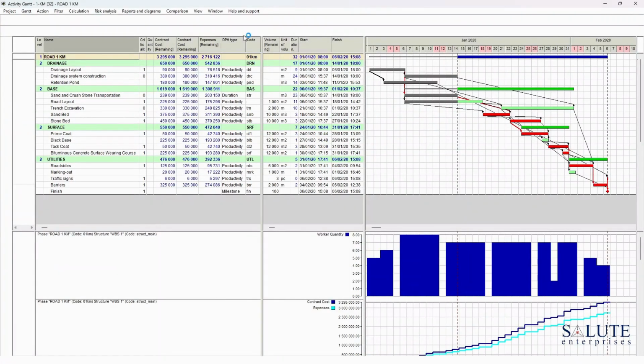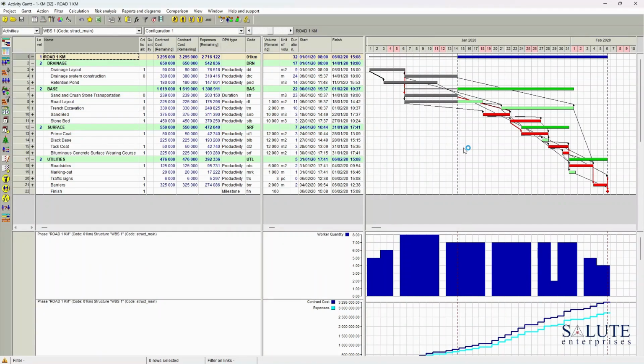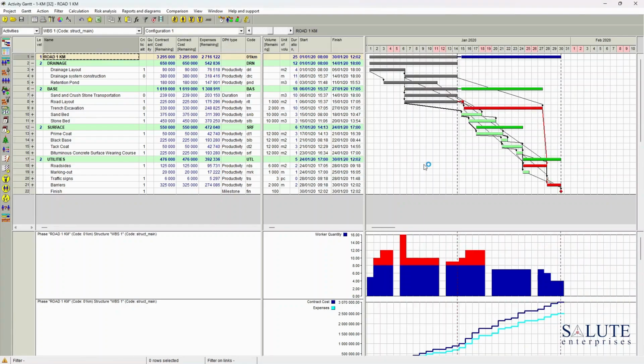Just remember to recalculate the schedule with the progress performance reflected in the project, either by simple scheduling or with resource constraint scheduling. So the actuals or performance is applied to the project schedule, and you can see your revised calculated schedule and the dates.